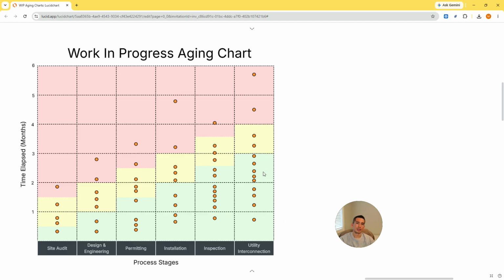And there's a separate chart that goes along with this, which is all of your work items completed in a scatter plot that shows you your cycle time per project, also shown in a similar fashion. Then you can see a trend line and look at your 85th percentile completion rate.